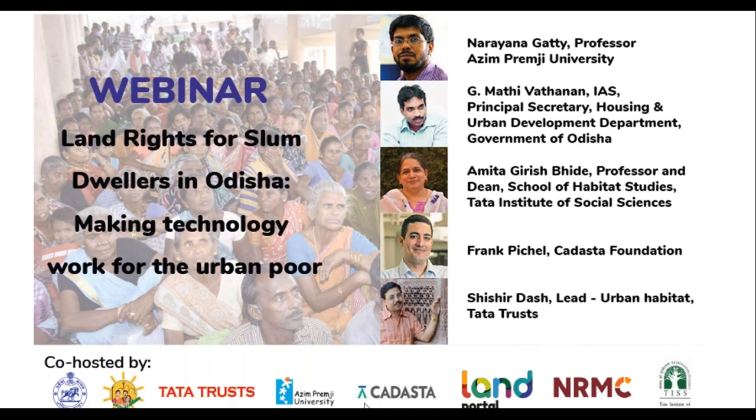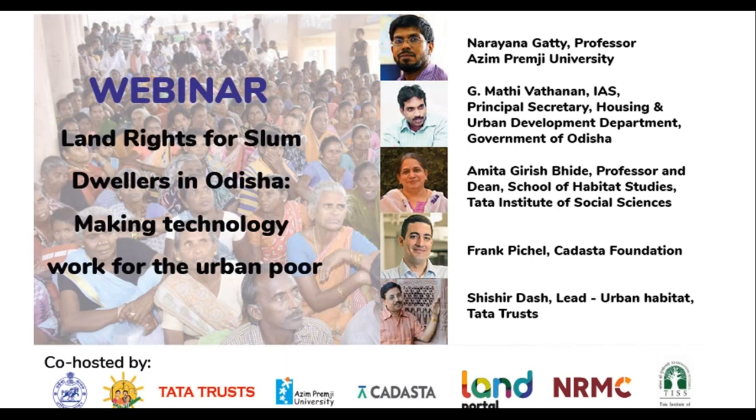I can add one more problem which we encountered in some areas. In Odisha's urban areas, we never had many good, credible NGOs working in the field. The urban sector, unfortunately, did not have enough welfare program schemes involving NGOs. So when we involved NGOs in implementing this, we got several NGOs, but the capacities were lacking in many of them. In some places, the NGOs were absolutely hopeless. Somehow they got selected, and then we couldn't get rid of them. Several non-performing NGOs became part of the program, which delayed the implementation process in those towns.